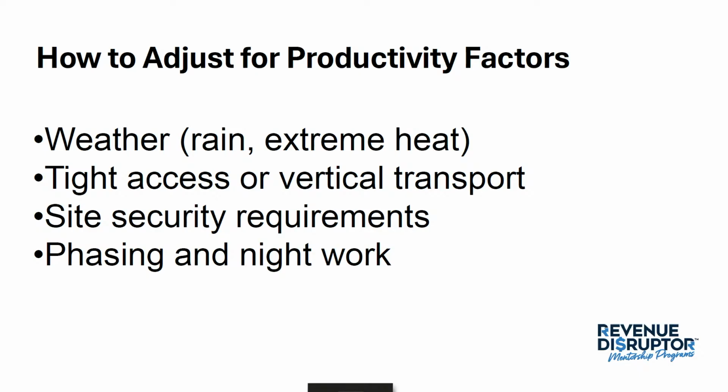Case in point, during the summers here in Florida, our roofers, especially the good ones that really care about safety, will take a break every hour. They will come off the roof and take a 15-minute break every hour, because they don't want their staff to become heat exhausted or have any type of dehydration or overheating. So they let them come down and cool off for 15 minutes before they go back to work.